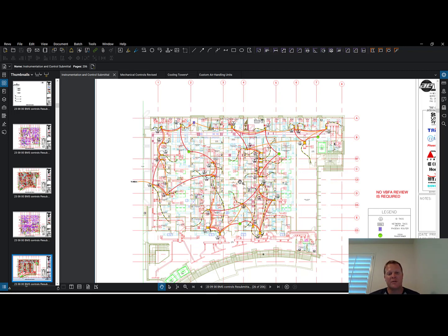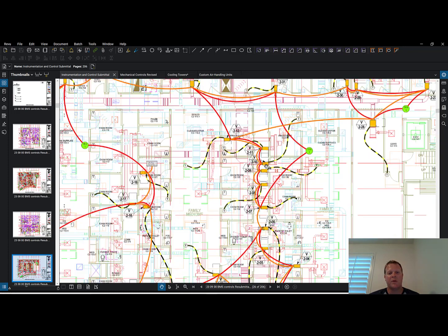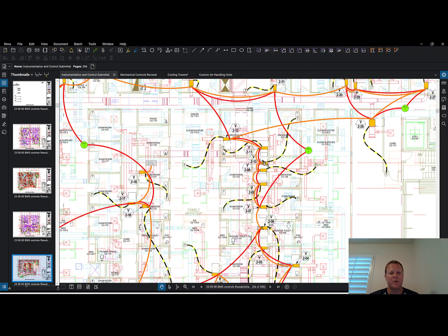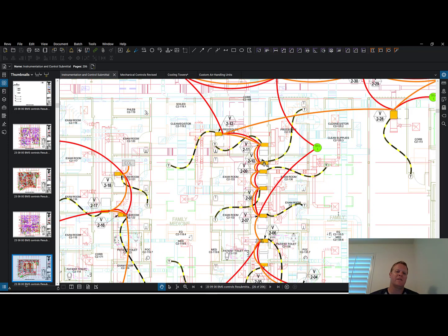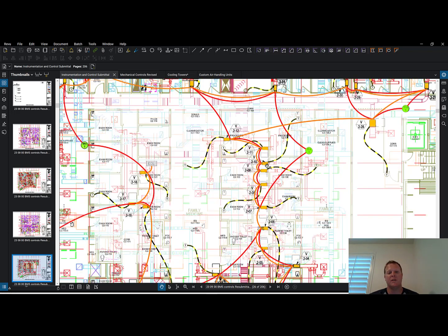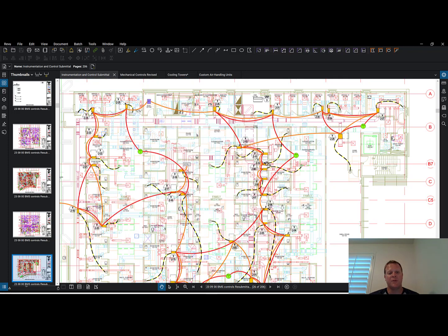I tell you what, the controls contractor and the control wiring is something that needs to land in somebody's contract. Is the low voltage wiring being covered by the person installing the VAV? Well, the person installing the VAV is the mechanical contractor. Do they have a low voltage company or a low voltage side of their company?